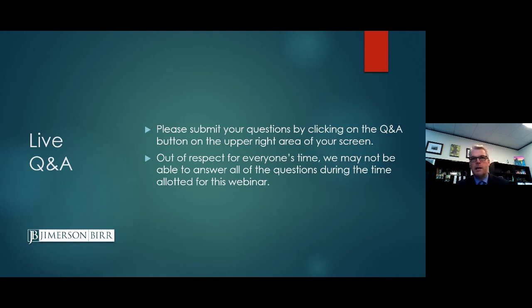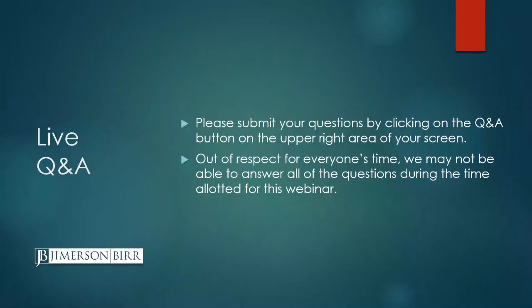But if it's something that involves big ticket items and defects and design claims and things like that, pre-suit mediation doesn't lend itself well to getting those types of matters resolved. Typically nobody's done the type of homework that you need to do to be able to tee those types of claims up in a pre-suit mediation. So just keep in mind that at some point, if the case gets into litigation in Florida anyway, you're going to have to mediate it, and by that time, in all likelihood, the parties will be in a position where mediation would be fruitful.